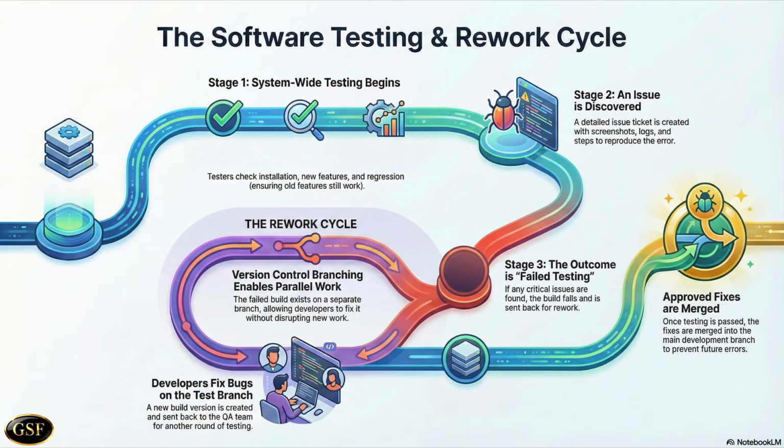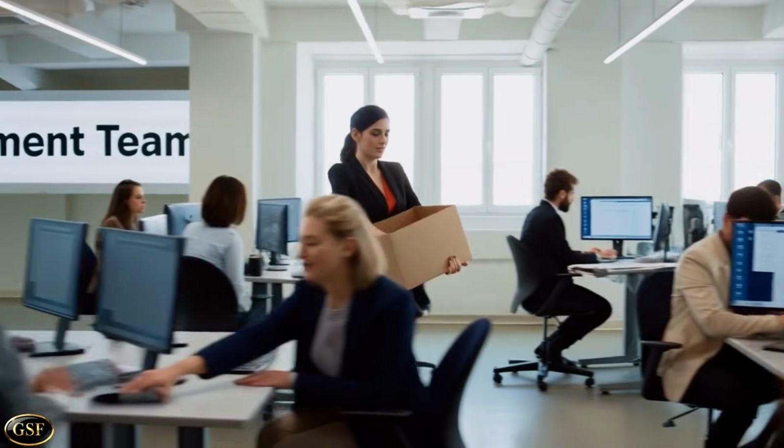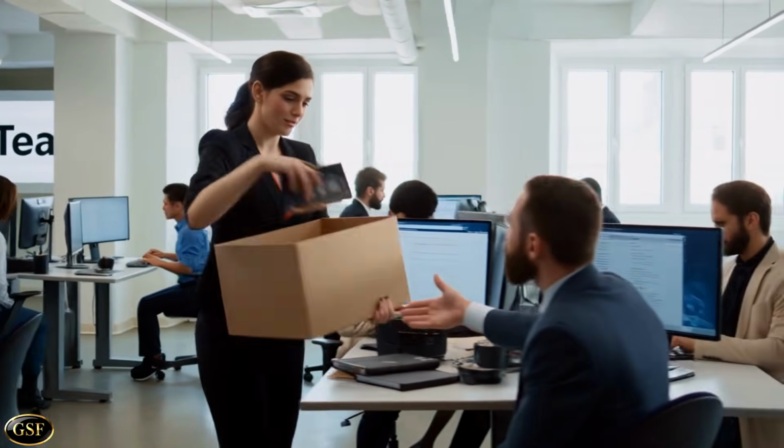However, you should expect and plan for more than one iteration of the testing phase. Once an iteration of the testing phase has been completed, with one or more entries marked failed testing, the system or product is passed back to the project manager to initiate a rework phase. Project managers should have already built in a contingency to their project plan to cater for the possibility or likelihood that rework will be required. However, next we will look at just how a development team will cope with this rework phase of the project.